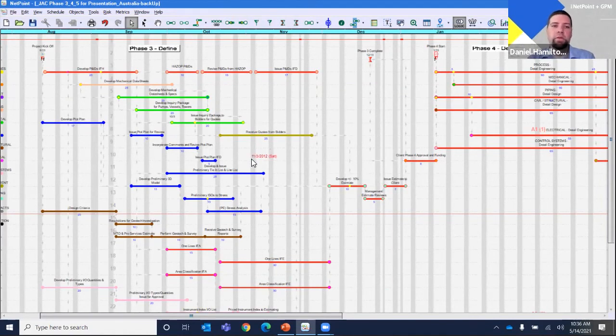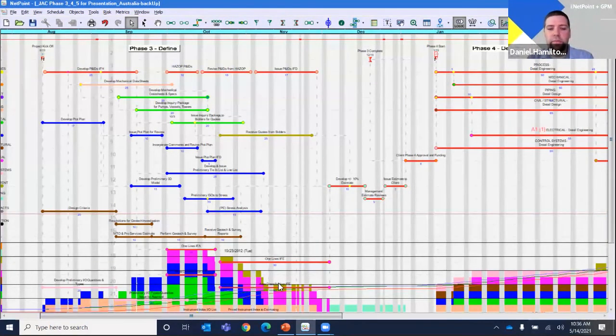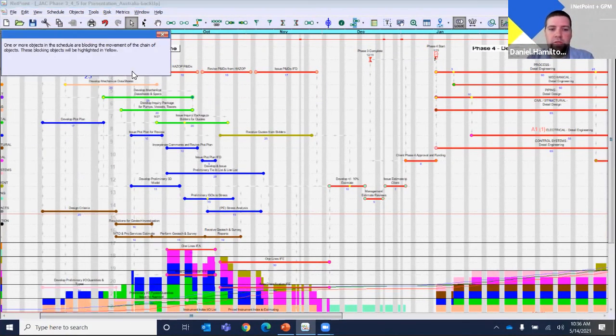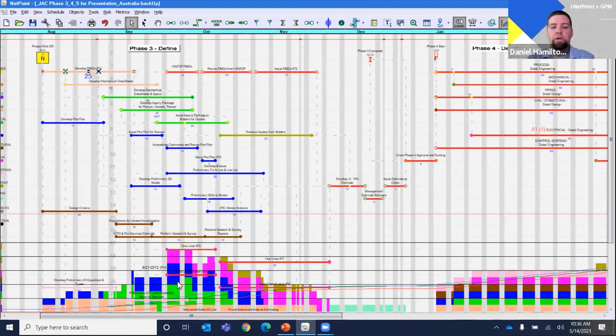And how it impacts other disciplines. And then we like to show the histogram here, which is also another benefit of doing these, of where resources are most used in the project. And a lot of projects like to use this histogram as well. But you do have to initially set these activities up with hours or dollars or whatever is defined in the project to get these histograms.